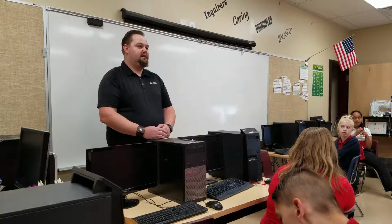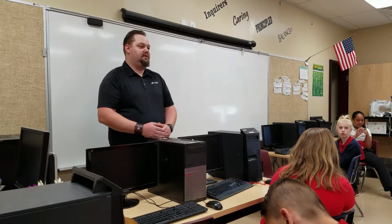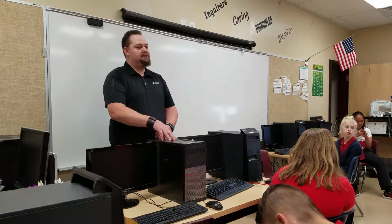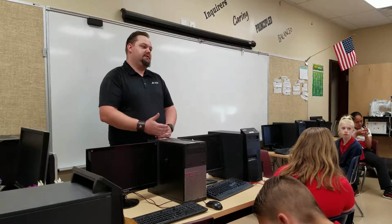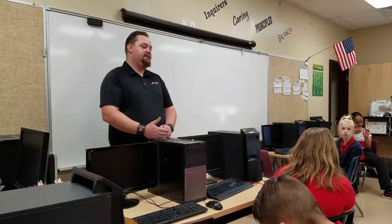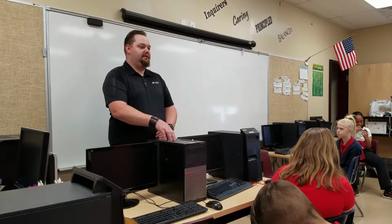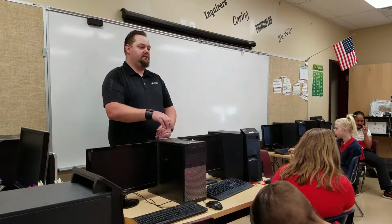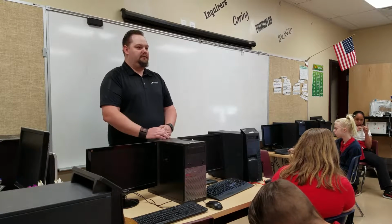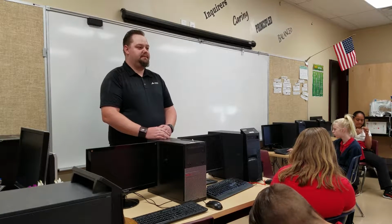So a general contractor is somebody we hire to do the work. The superintendent oversees what they do. At the beginning of a project, we'll send out a set of plans, and they will take those plans and look them over and send us a bid for the contract to do the work. If that general contractor comes up with the right number and the right verbiage in their contract, we'll choose them to do the work on our job site.